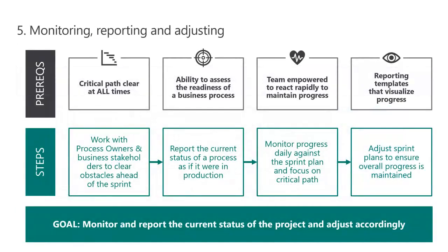Okay, so for monitoring and adjusting, again, which is a critical part of this approach, you need to make sure that on a daily basis, you are monitoring the progress of the project, and on a daily basis, you are adjusting to the signals you're receiving. The daily triage that's happening has some meaningful action that comes out for the PMO and for the team leads to say, here are the obstacles ahead. This is what I need to fix before tomorrow. I need to go and get this done before tomorrow. It's at that daily cadence that you're adjusting and monitoring.